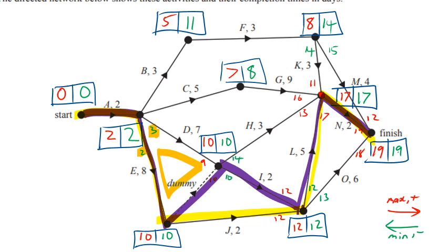So the answer for the question, which we'll get back to in a minute, of what's the other critical path, it's not A, E, J, L, N. It is A, E, don't include the dummy. Don't include the dummy. Only dummies include the dummy. I, L, N. All right. And so the other thing was determine the float time for F. F is up here. Float time, we've actually got it quite easily highlighted there. It's 11 minus 5. So that's 6.